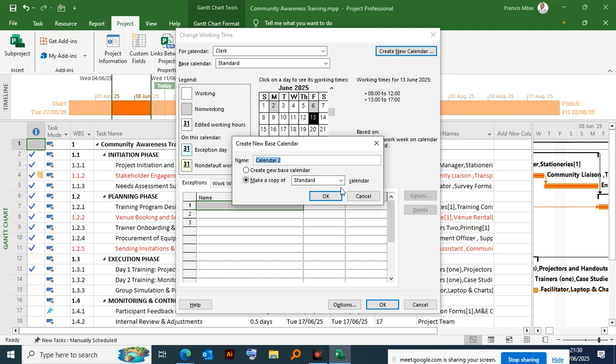When you create a calendar and say that you will not be available on site, it's like you have your own calendar, that on that particular day you will not be available. But where can you indicate it? You can only create a calendar within this calendar, such that the system can detect that on this particular day this person will not be available.